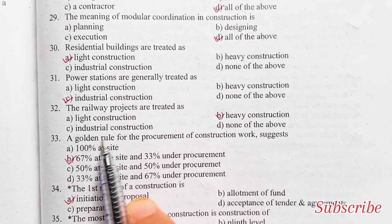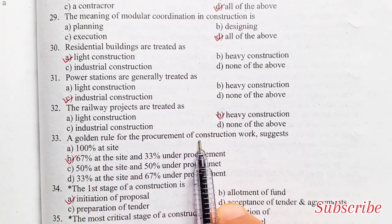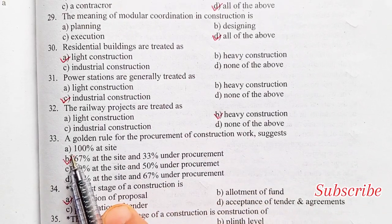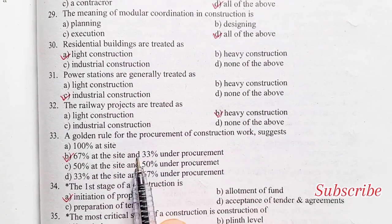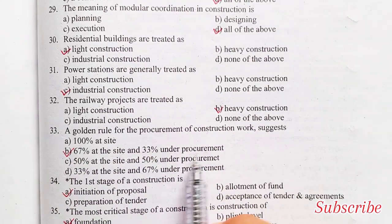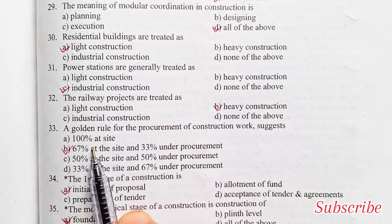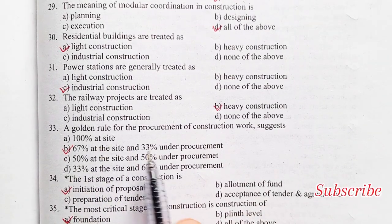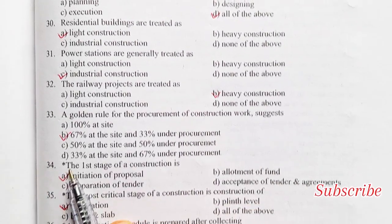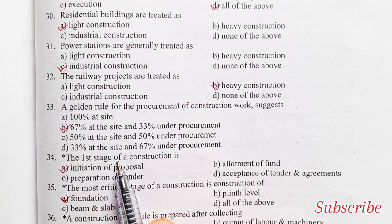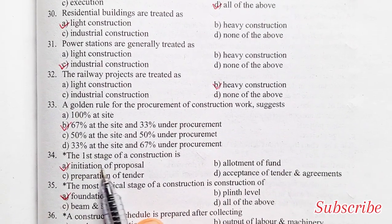The golden rule for procurement of construction work suggests: 100% at site, or 67% at the site and 33% under procurement. Option B is the right answer — 67% at the site and 33% under procurement.